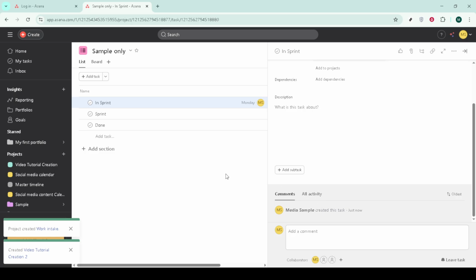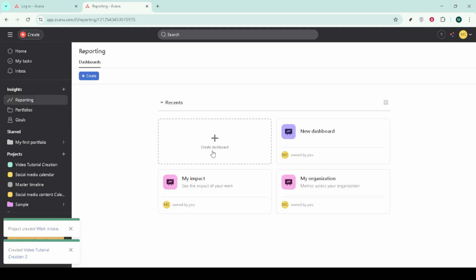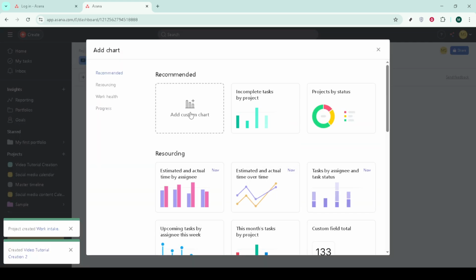When it's time to plan, decide your sprint length and capacity, confirm the sprint goal, and ensure everything you pull is truly ready. You can either create a new board project for each sprint or manage sprints as sections within your main board. Separate sprint projects make archiving and reporting cleaner. Sections keep everything in one place. Pick the approach your team will maintain consistently.